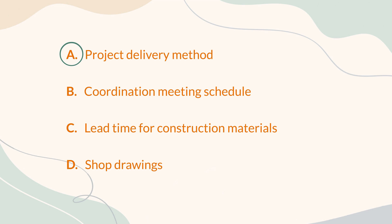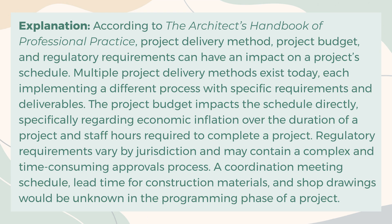The correct answer is A. Project Delivery Method. Explanation: According to the Architect's Handbook of Professional Practice, project delivery method, project budget, and regulatory requirements can have an impact on a project schedule. Multiple project delivery methods exist today, each implementing a different process with specific requirements and deliverables. The project budget impacts the schedule directly, regarding economic inflation over the duration of a project and staff hours required to complete a project. Regulatory requirements vary by jurisdiction and may contain a complex and time-consuming approvals process. A coordination meeting schedule, lead time for construction materials, and shop drawings would be unknown in the programming phase of a project.